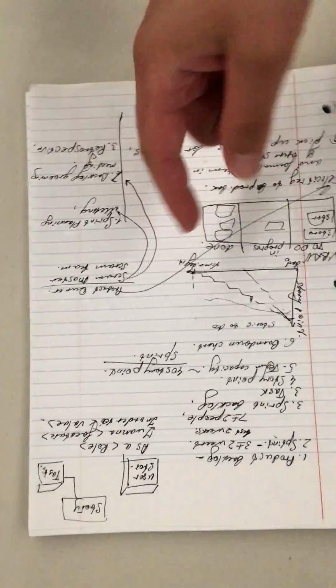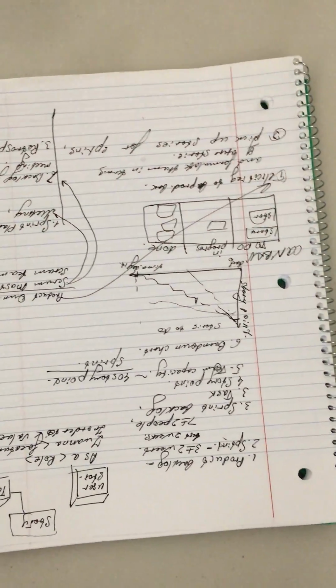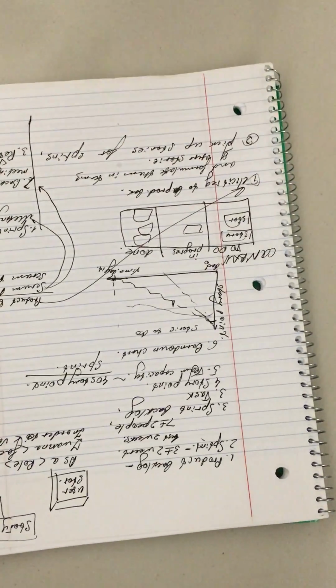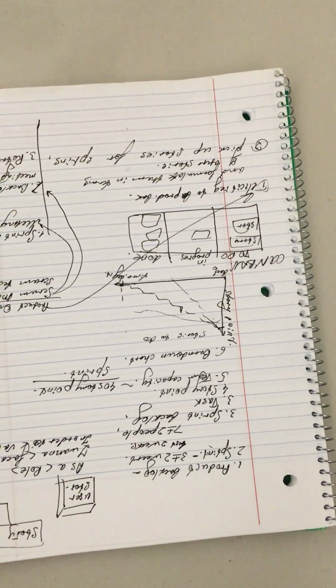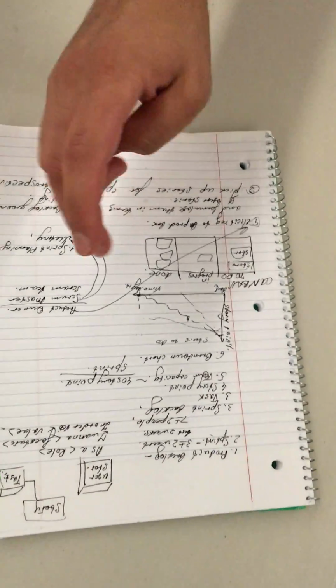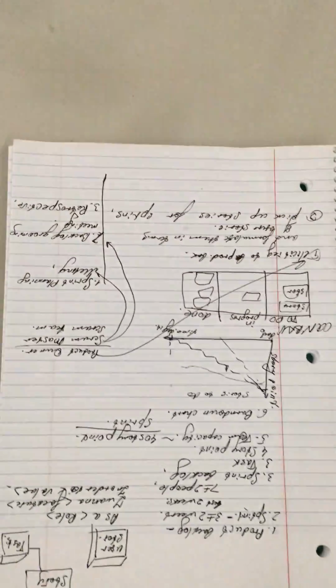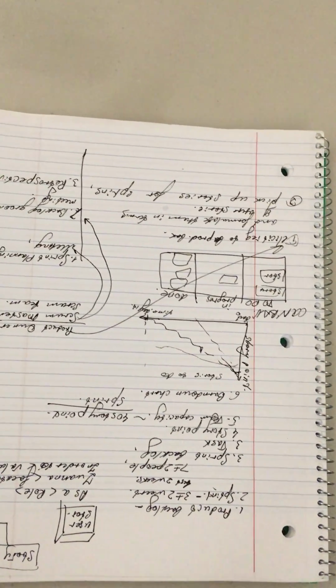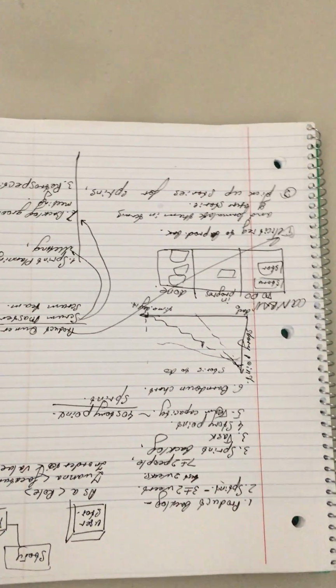If you have a special column for QA, so in this case, if we have just 3 columns, QA is just a separate story. Test, feature, and so on. If we have QA as a separate column, it's going to be a continuation of the life cycle of the same story. And if we see that all stories get stuck in QA, probably we need to fire some QA guys, or maybe hire someone.